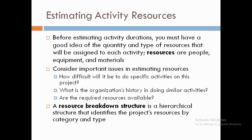The fourth process is estimating activity resources — that is, the quantities and types of resources required for completing the project. Key questions include: are the resources for activity completion available, what is the difficulty of certain activities, and what is the organization's history in doing similar activities? A resource breakdown structure is used to provide the category and types of project resources.